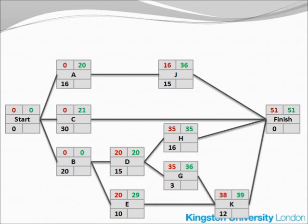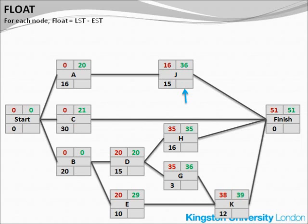We are now entering the final stage of the whole process — calculation of the float. If you look at node J, its earliest start time is 16, but its latest start time is 36. The difference between the two is 20. If these were days, it leaves enough time to go for a Caribbean vacation, come back, and still get the job done in time. This difference — LST minus EST — is what we call float, and this is 20 in the case of activity J.